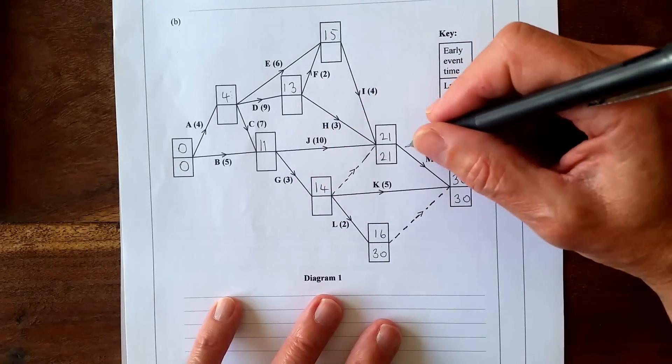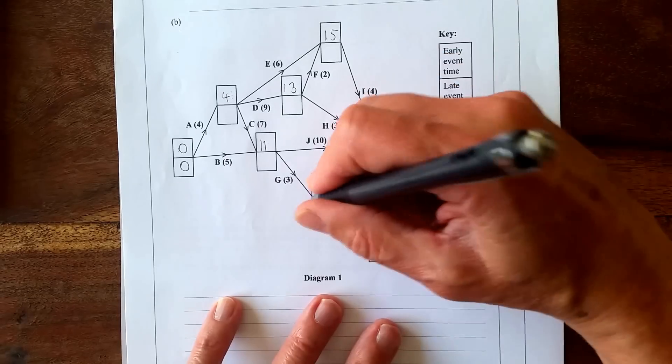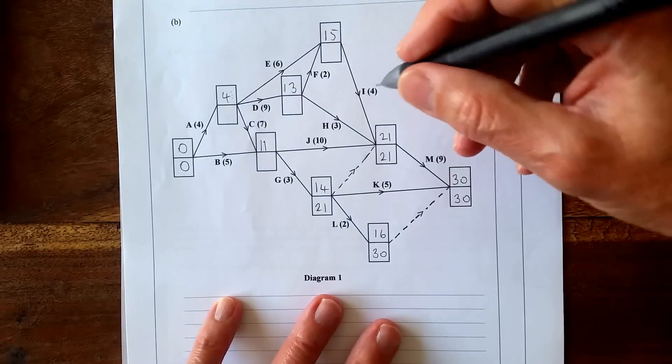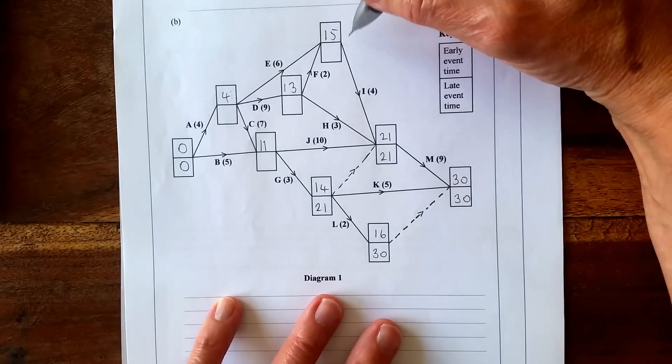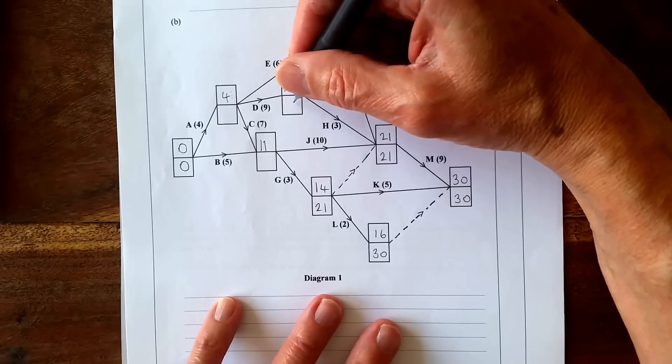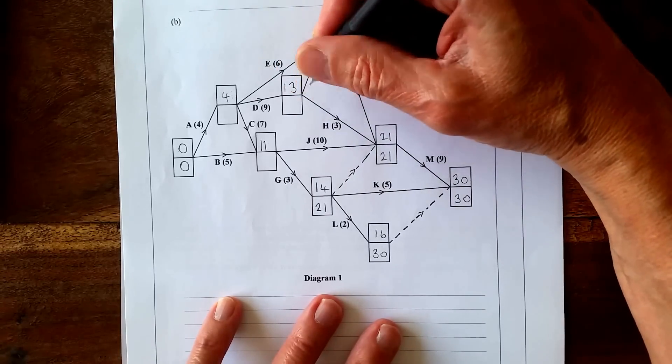And 21 take away nothing is 21, which is smaller than 25, so put 21 in. 21 take away 4 is 17. And then we've got 21 take away 3 is 18, but 17 take away 1, now let's try this one, take away 4 is 15, which is smaller.